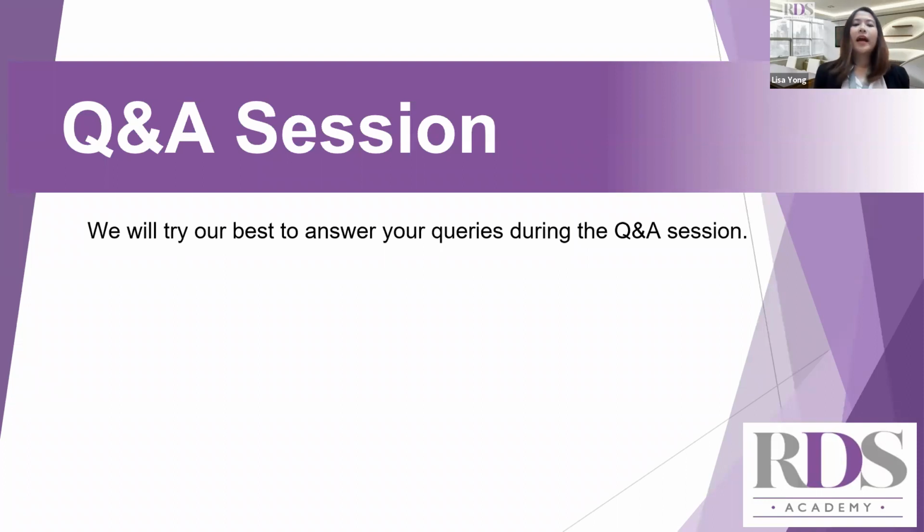Is it possible for housing developers to extend time in delivering vacant possession? The short answer is yes. However, it has to be a mutual agreement. So for that to happen, the buyers have to actually agree to such extension before a housing developer could actually extend the time in delivering the vacant possession.